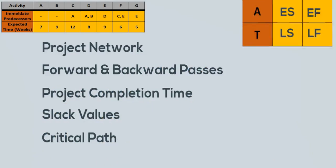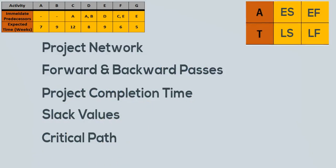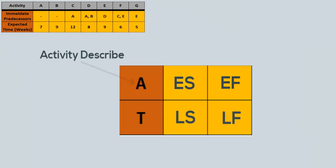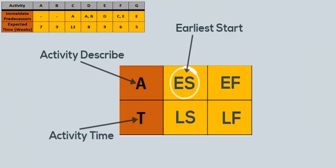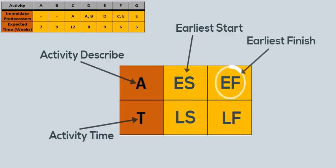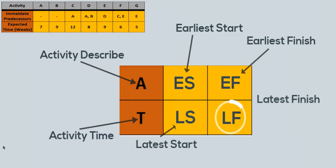I will be using this node convention as you will find in quantitative methods. A is the activity being described, and T represents the expected activity duration or time. ES is the earliest time when the activity can start. EF is the earliest finish time. LS is the latest start time, and LF is the latest finish time without extending the minimum completion time of the project.